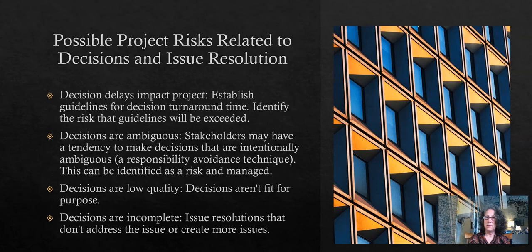They were instructed that they didn't have permission to make demands or to ask for new functionality, although they were clearly doing that. But it was always framed as if, oh, that's what we were about to do, or that's the way we did use it, right? So although they didn't have the authority to add new requirements, they were actually doing that. That was a kind of risk that probably would fall into this category.